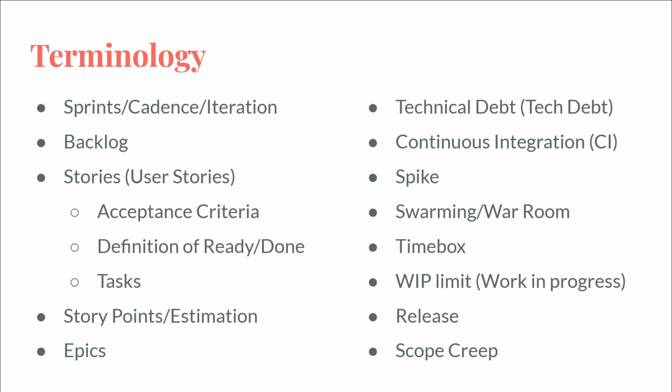So with that, if everyone holds up a 3 and you hold up a 5, then the person running that meeting would say, okay, everyone said 3. Why did you say a 5? Is it actually a 5? Is there something that you know about this part of the code base that other people don't know about? Have you worked in this area and they haven't, and it's going to be harder than they expect? Or did you just overestimate and you're willing to be talked down to a 3, right?